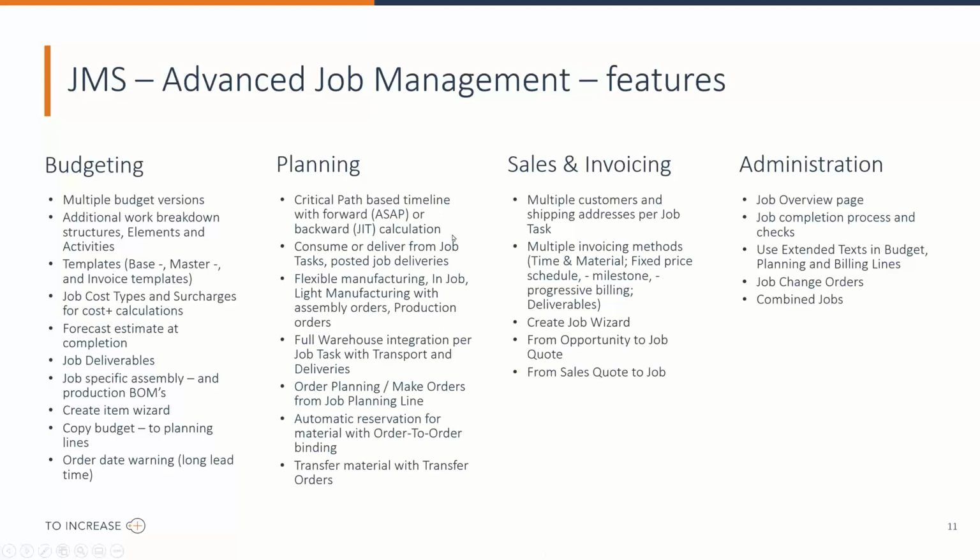And then, of course, there is the planning. We calculate a critical path-based timeline with either serial or parallel tasks, so we can quickly determine the end date of the project. You can consume material from the planning line or deliver it from the planning line. That is specifically interesting for those companies that do installations at the job site, where they have to carefully plan the sequence of the material being delivered to the job site.